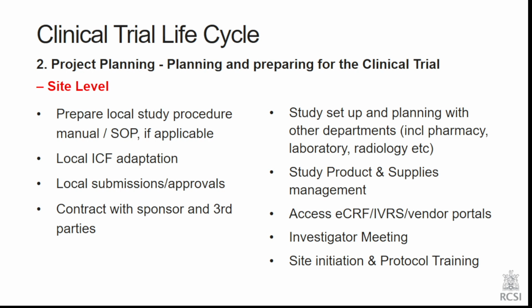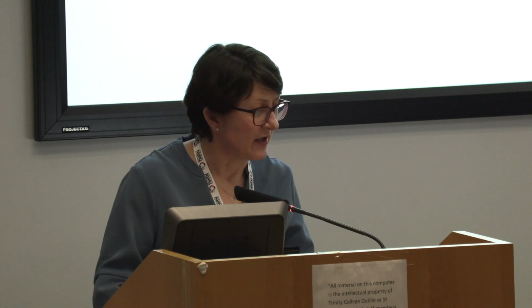And again, to highlight the two areas where we're seeing the biggest delays at the moment: the local submissions and approvals. Now, some hospitals are better than others. They have streamlined processes in place, but we're seeing a lot of delays around getting documents assessed at a local level, getting contracts signed off, getting agreement on the specifics for individual hospitals. And we're getting feedback from the pharmaceutical companies that it's taking too long. Their interest in doing trials in Ireland is waning on occasion, and we need to be careful about that and try and streamline those processes for Ireland.